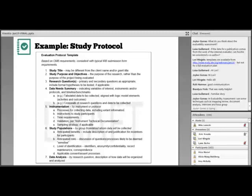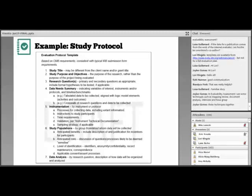We'll probably need to get incentives to get students to contribute to an hour-long focus group rather than filling out the survey. We're going to need to check with our human subjects institutional review board folks to make sure we accommodate all of the consent rules, because there's no way to make focus group data anonymous. The biggest hit on your time and your budget is that it's going to take more time to analyze and write up the qualitative data that comes out of the focus groups compared to what would come out of the survey system.